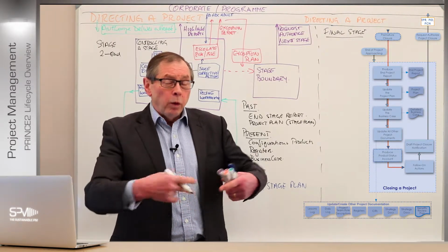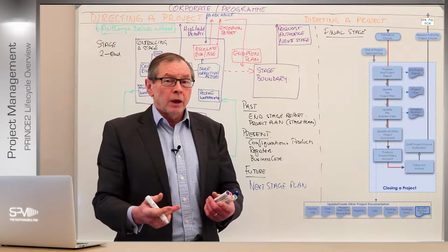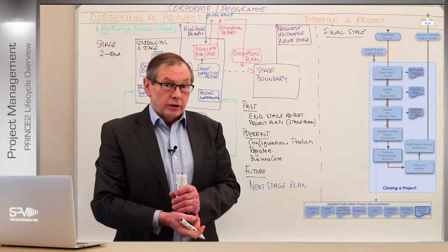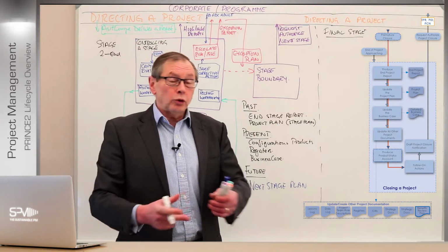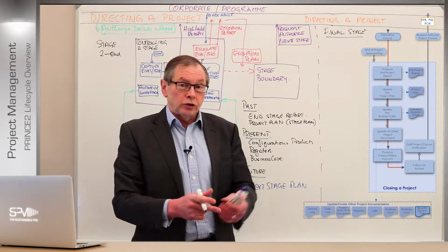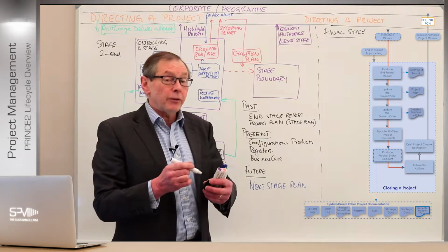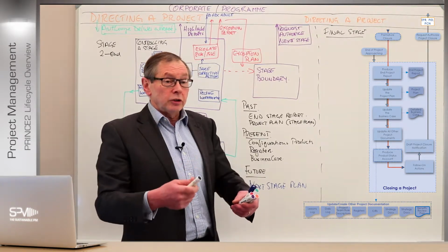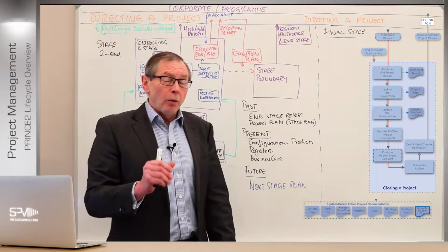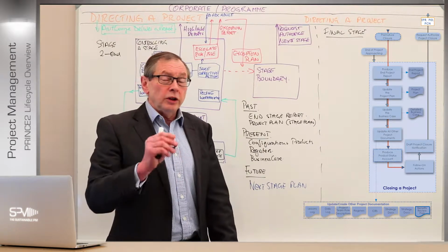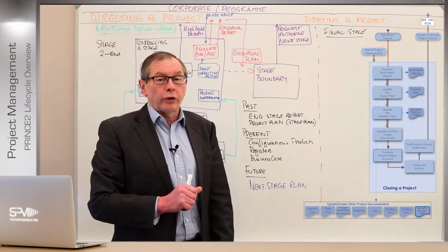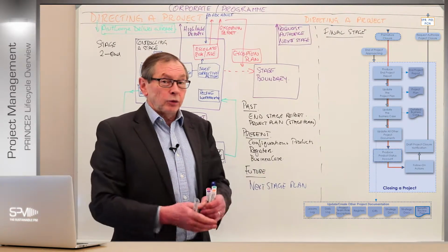Remember, this is the whole point. You need to tailor all these methods, PRINCE2 or whatever, to fit what the project needs when it needs it through the project, right? So you can be a mixed match of all sorts of techniques and approaches as you go through. So it doesn't really matter. Just making sure that you understand what the project will need to do it. Right? And don't be afraid to change things. If you need to change things, just make sure that anything changes, everybody understands that. But far more important, that somebody who has the authority signs that change off. Right? This is crucial. Somebody needs to authorize the change. Right? And that's what happens.